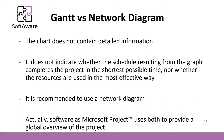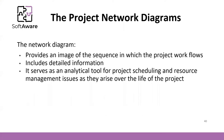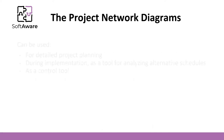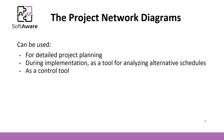In software that supports project management, such as Microsoft Project, they use both a network diagram and a Gantt diagram. The network diagram provides an image of the sequence in which the project workflows, includes detailed information, and serves as an analytical tool for project schedule and resource management issues as they arise over the life of the project. They can also be used for detailed project planning and during implementation as a tool for analyzing alternative schedules and as a control tool.